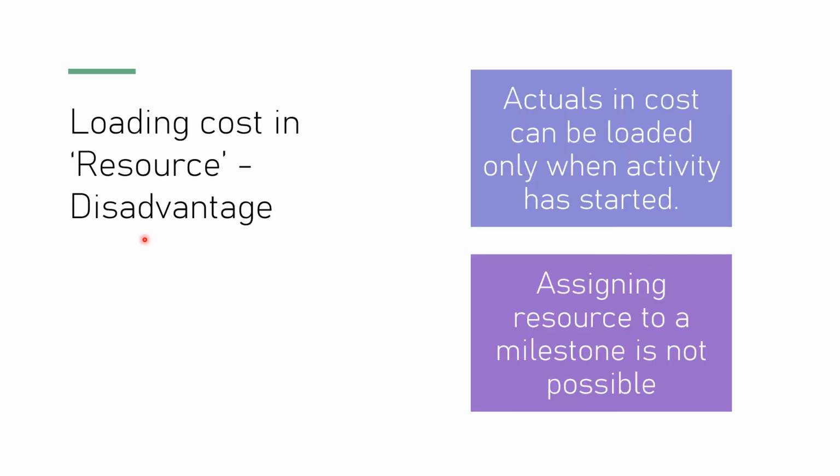What are the disadvantages? Actuals in cost can be loaded only when activity has started. Assigning resources to a milestone is not possible.